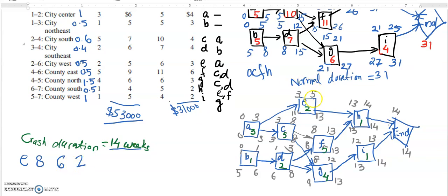So it means that if we can increase this time to its original duration, it is not going to affect this project because that will be within its slack. So for example, if it is now 6 days, so it will be 3 plus 6, it will be 9 days. It will finish at 9 days. The next activity is anyway going to start at 13 days, so it is not going to affect the schedule. So what we can do is bring it back to its original duration.